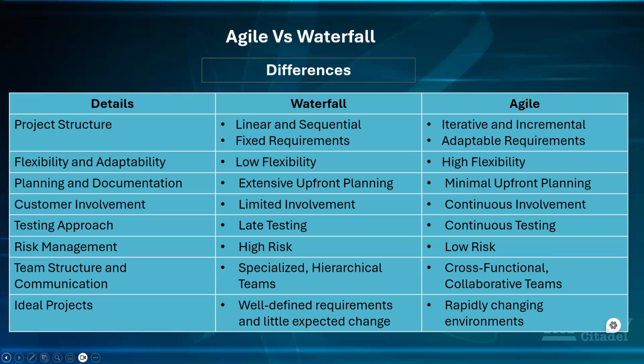In planning and documentation, we know that for waterfall there is extensive upfront planning. All the planning is done in the beginning. Waterfall requires detailed upfront planning and documentation. Every requirement, every specification is typically defined before the project begins. So it's more of the theory aspect, not the practical applicable aspect when it comes to waterfall.